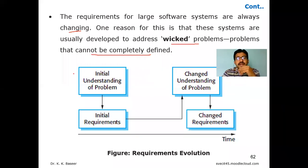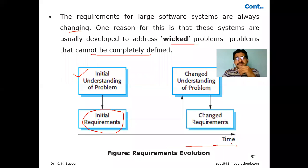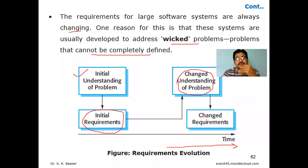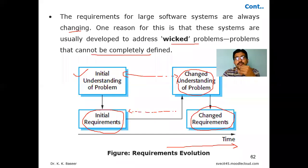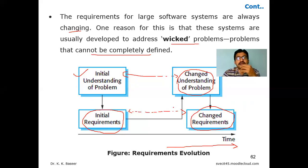As shown in the figure, initially you understand the problem and based on that understanding you collect initial requirements. As time goes on — along the x-axis — there is variation in understanding the problem. Initially you understood it one way, but after some time period you change your way of understanding. If you thought about it wrongly and need to change your understanding, then there is also a change in the requirement. This gap in understanding over time means planning is required.